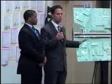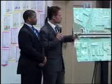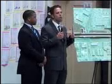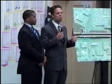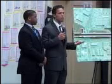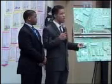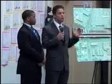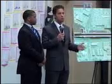One of the things is how we staged the construction: the construction staging is shoe fly on one side, our tracks on the other, allowing us to grade separate, and then high speed where the shoe fly tracks are. I should mention that is exactly the way you would have to stage it if high speed was here today. So number one, it follows the natural progression of how construction staging would have to occur. The other thing that works out is that 2-year construction lands us in 2012, which lines up exactly with what high speed is telling us right now. They should be on track with their environmental clearance, and they should be right behind us.